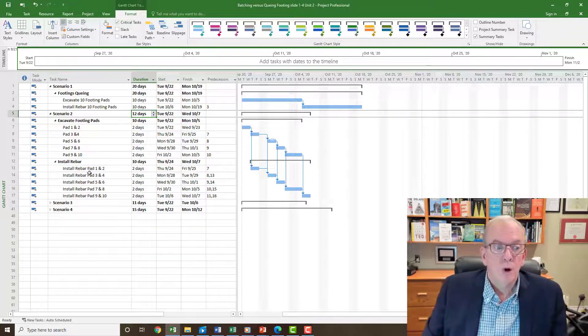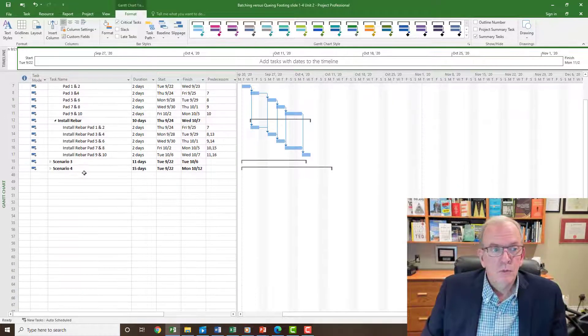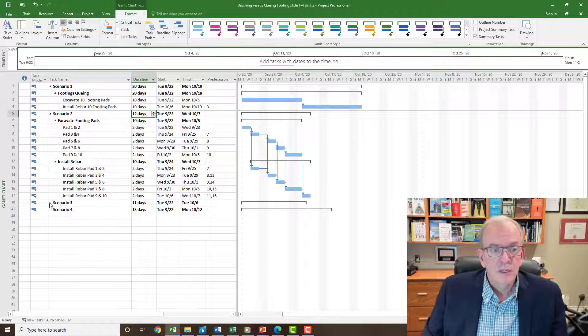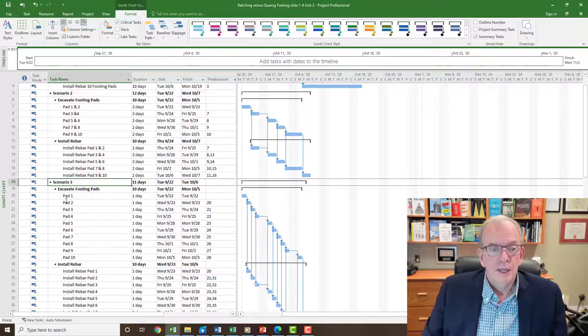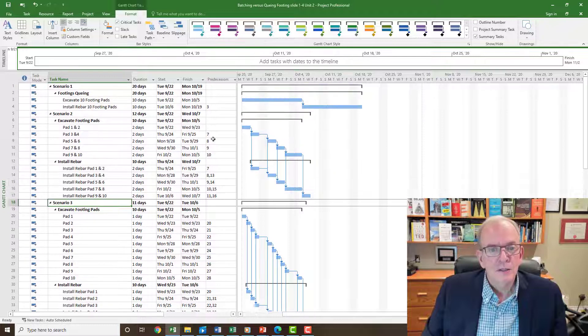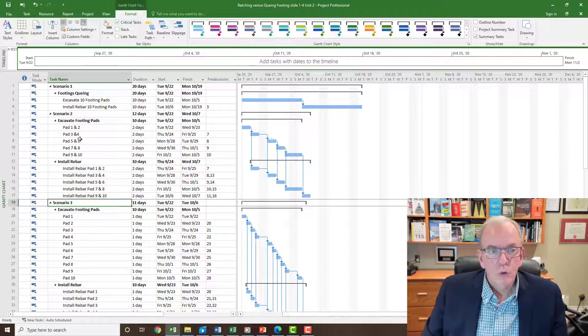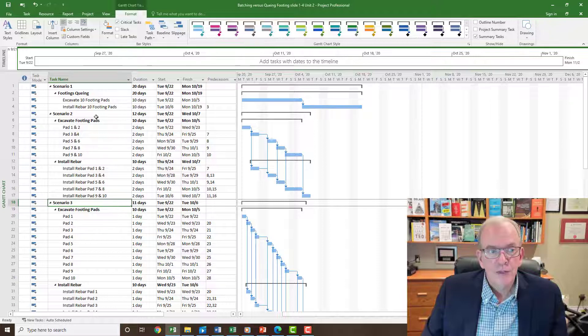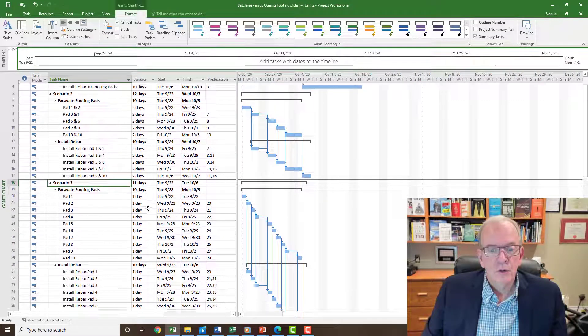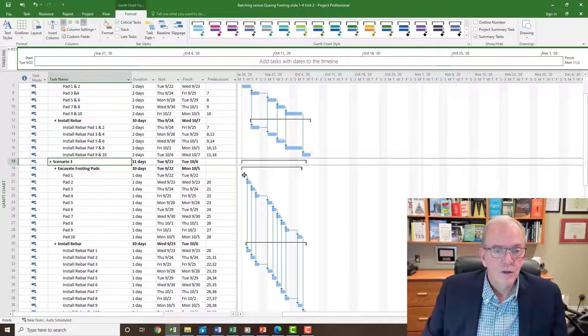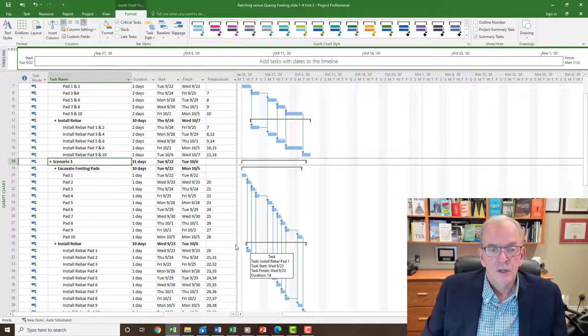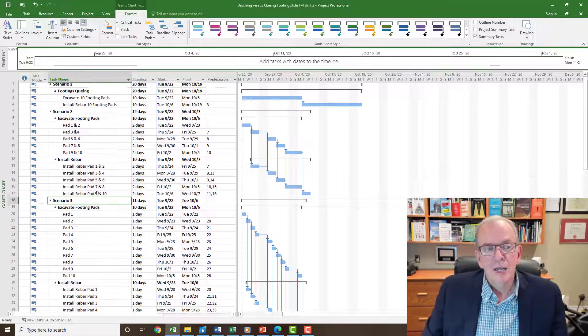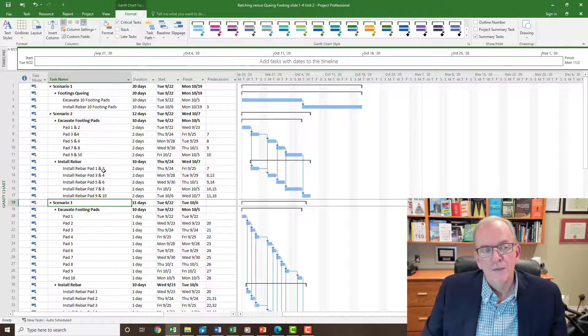So the question is, you might think, okay well you're doing two footings a day, what would it save if we do one footing a day? It doesn't have as big a savings going from the two to one. It has a huge saving going from the ten to the two. This will save you another day, so then you have to rationalize on your project. So you go one, one pad gets dug, the next day one gets installed.